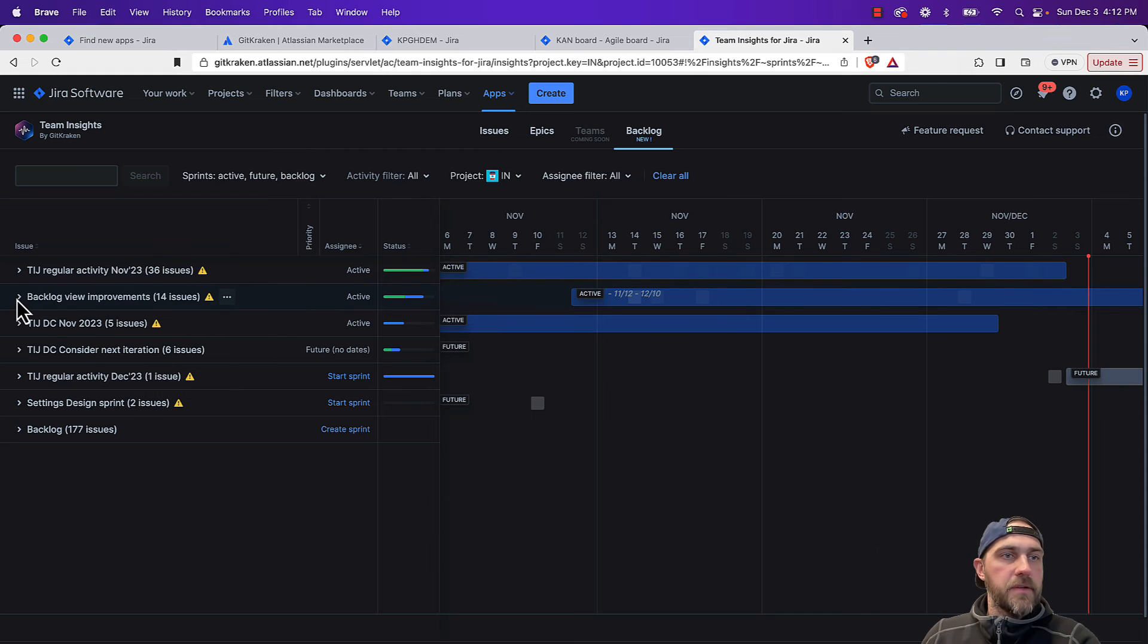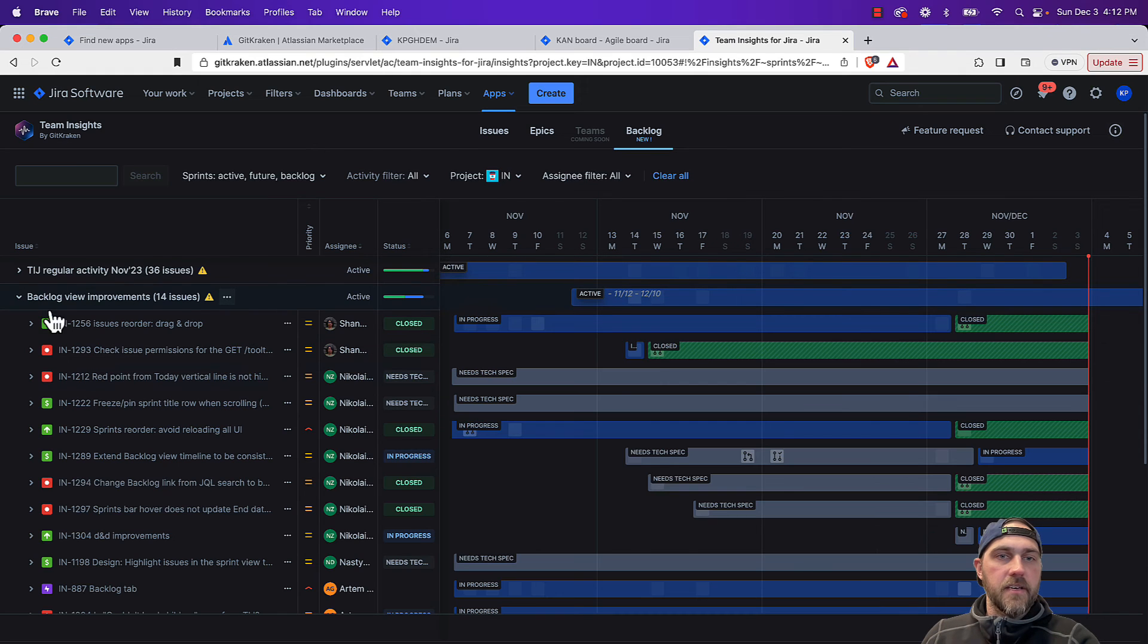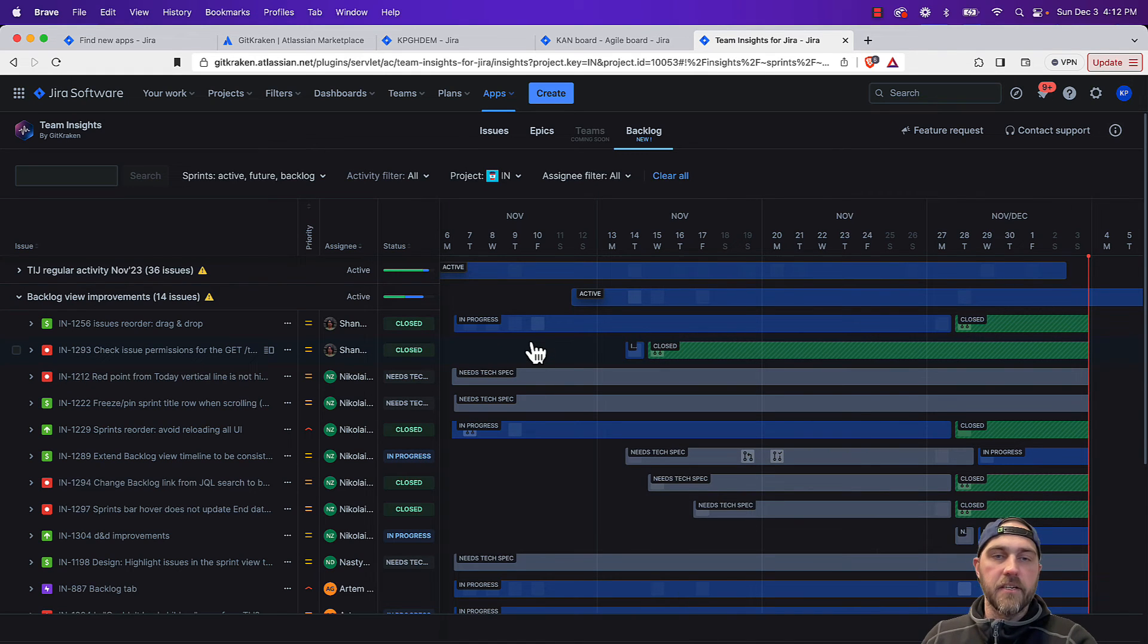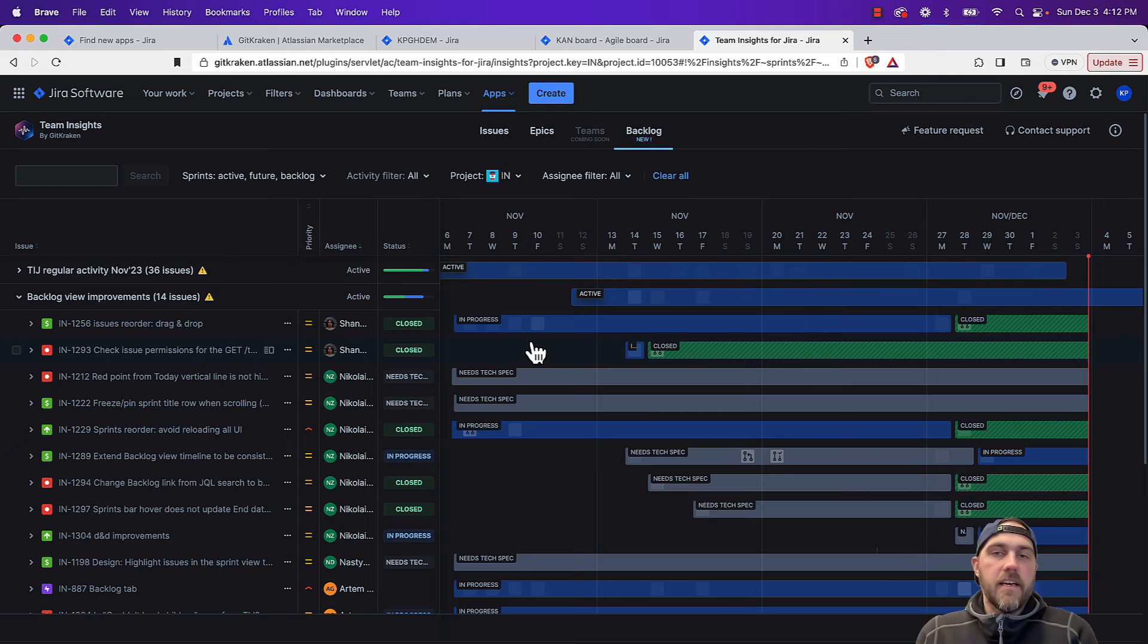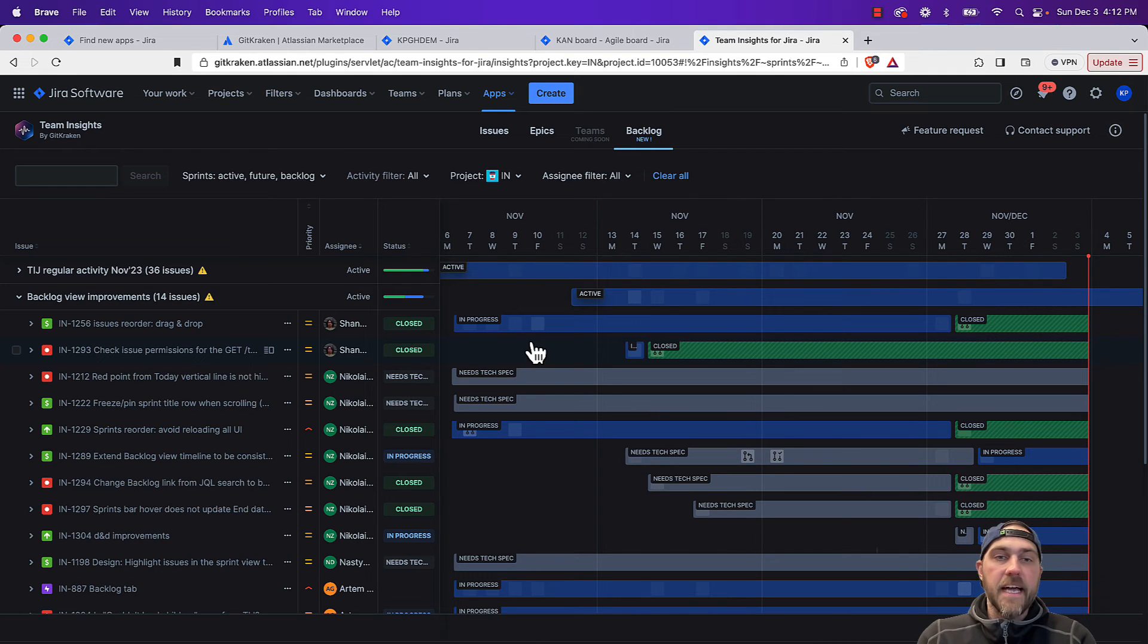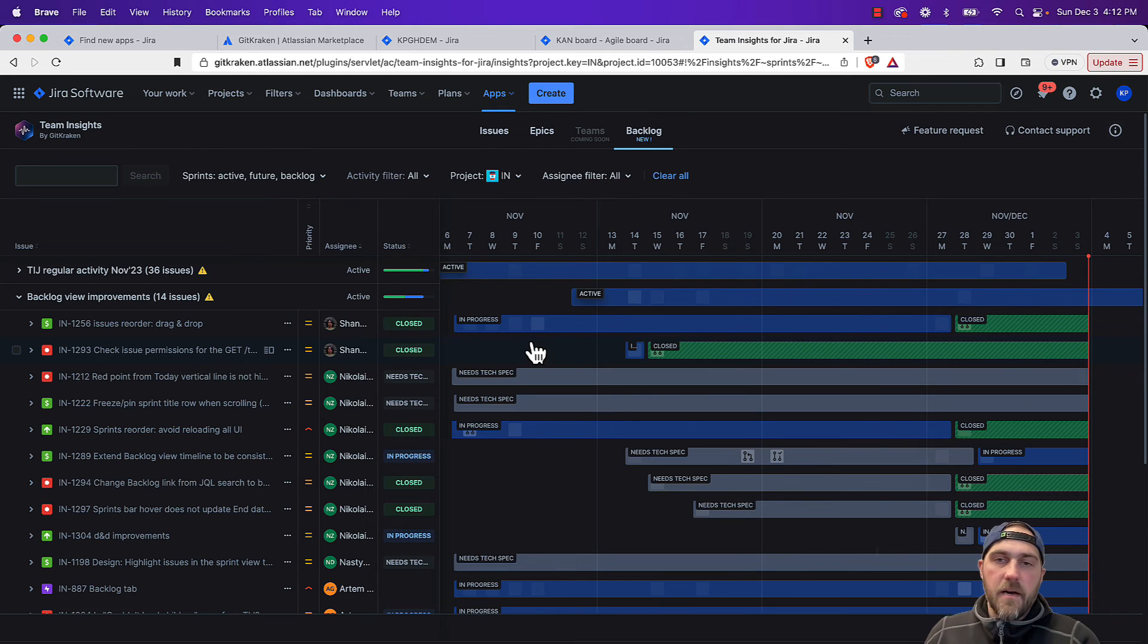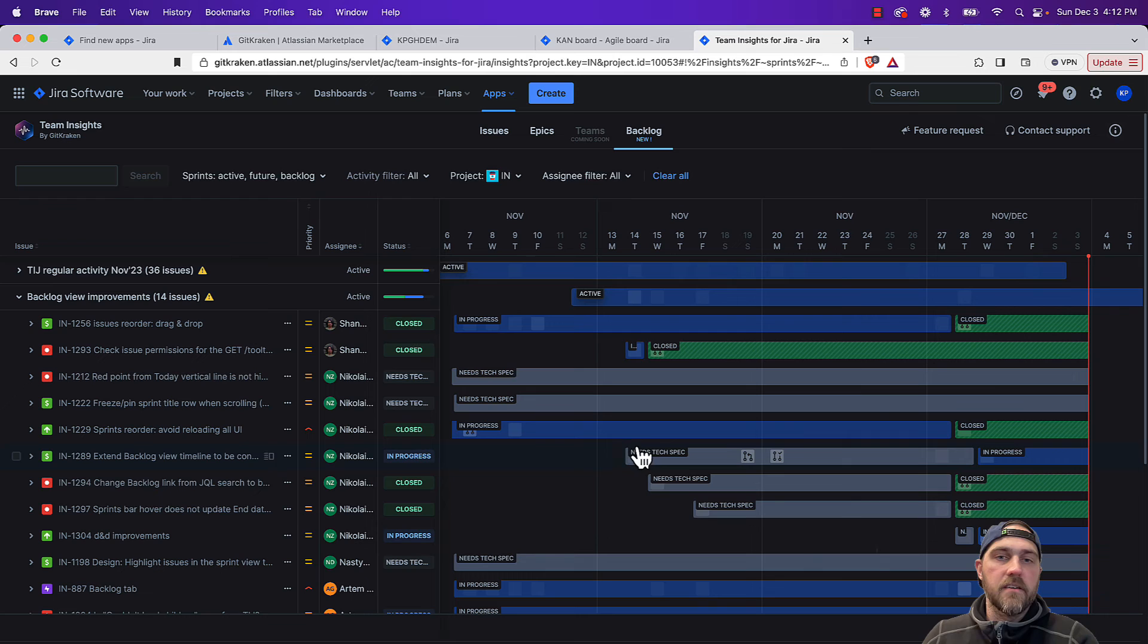If we expand the sprint, then we'll see all the issues that are included in that sprint and their corresponding status. So this gives us a timeline, shows us as an issue transitions from different statuses, and also has those activity boxes on every day.